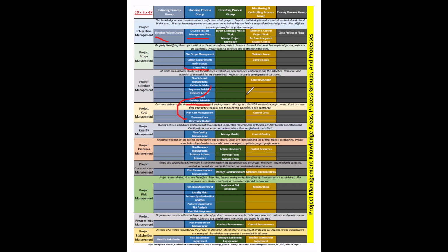Now, we have several different methods that we could use to estimate the cost. We have top-down estimating, which is also known as analogous. We would copy perhaps the cost in from other projects, or even within a branch of this current project we're working on, potentially. And we would use those costs to create our budget or our cost estimates. The other tool would be bottom-up estimating. Now, bottom-up estimating is generally the preferred method because it is more accurate.